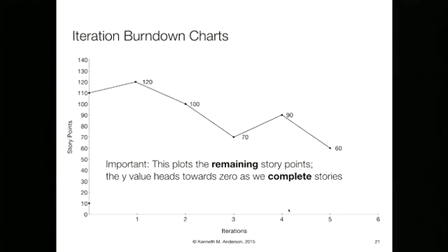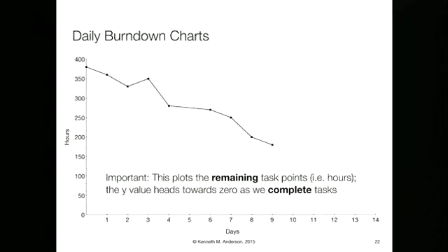And so now if, in your initial optimistic planning, which everyone acknowledges was based on guesstimates, release 1 was supposed to happen at the end of iteration 4, we can go back and see we lost ground here, we lost ground there, and that just put us off. We're planning on being done in iteration 8 or iteration 10. But it just becomes clear. It doesn't become hidden.